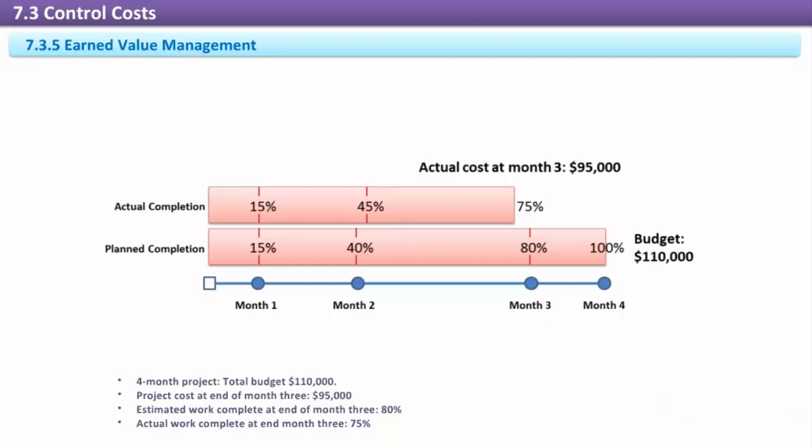Earned value measurements are taken routinely throughout the project, usually at predefined periods, such as monthly, but generally only after about 20% of the project's work is completed, because the EVM measurements are helpful only after there's sufficient data from execution activities. Earned value analysis can also be used to provide performance information for phase gate decisions, such as whether to continue with the project or not.